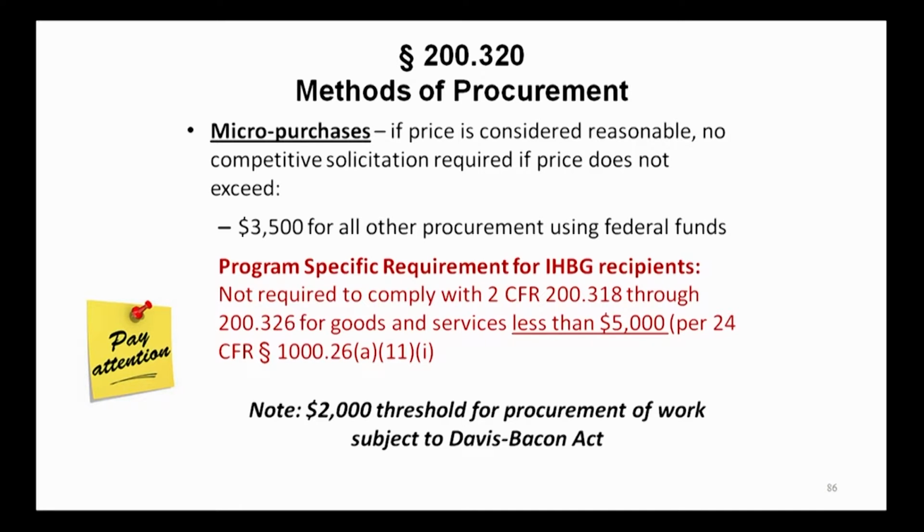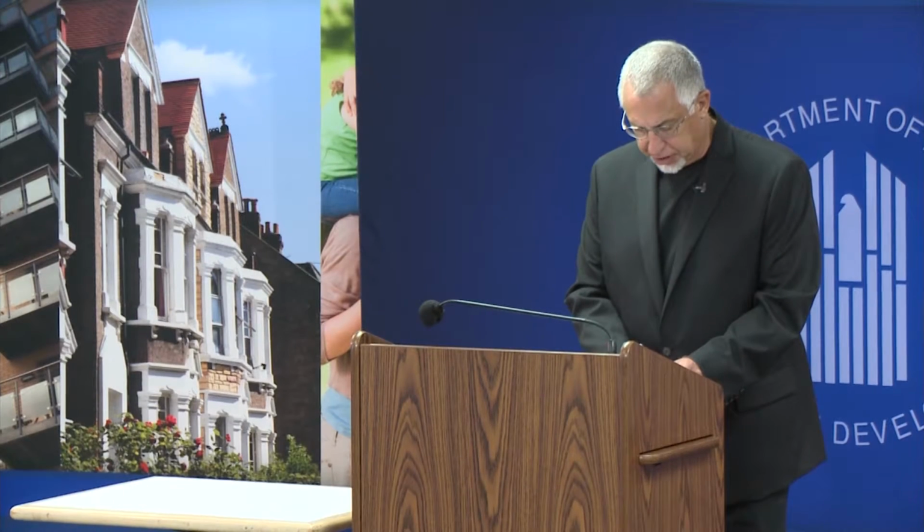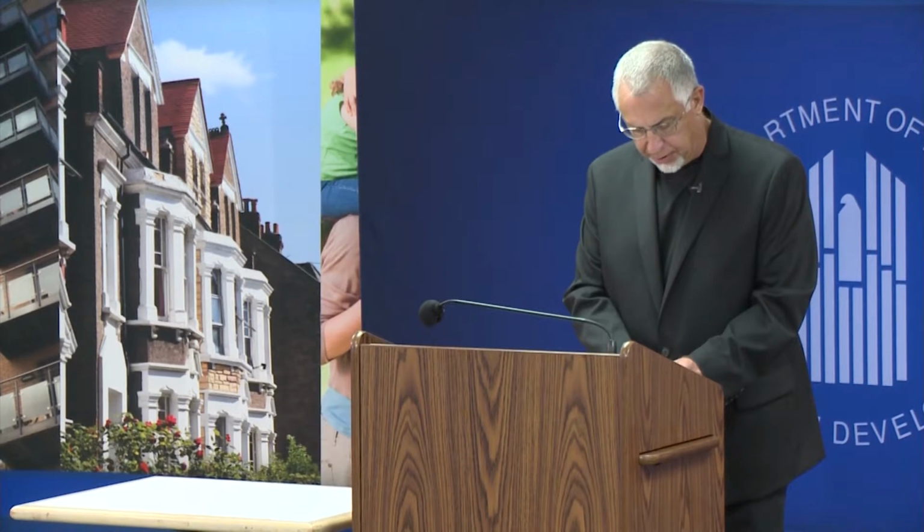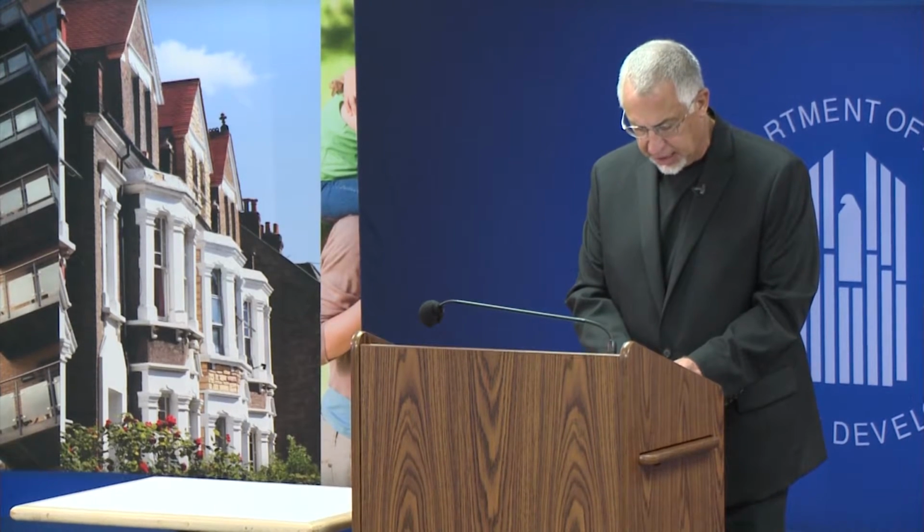Let's go ahead and take a look at the definition of micro-purchase or the description of micro-purchase under 200.320. A, procurement by micro-purchases. Procurement by micro-purchase is the acquisition of supplies or services, the aggregate dollar amount of which does not exceed the micro-purchase threshold.